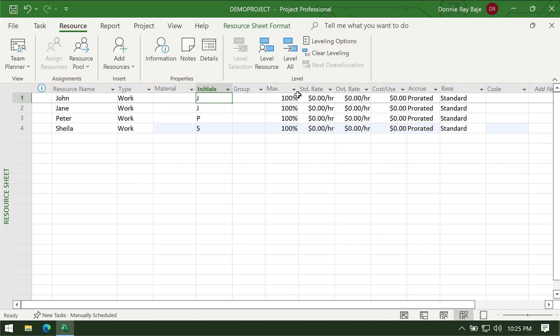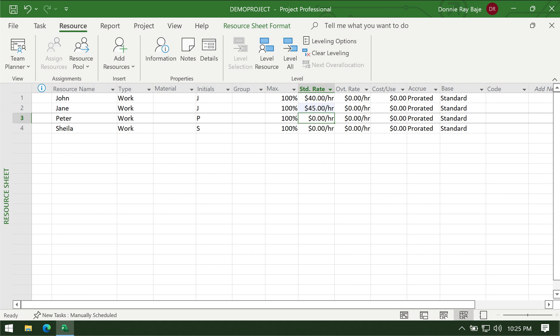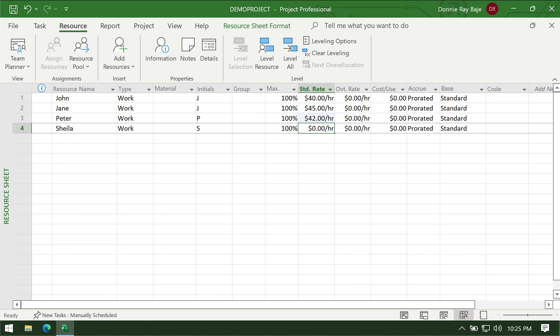The next part is the standard rate — how much do we pay each person per hour? We have to assign a certain number here. So for example, let's put $40 for John, $45 for Jane, $42 for Peter, and $35 for Sheila.